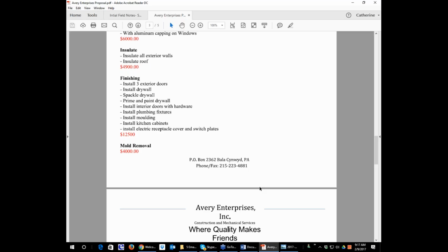So for example, if I put on your project a line item that says install rough-in plumbing for first floor apartments, including waste line and supply lines. Well, if when I get out to the property you have the lines in but you don't have the fixtures, let's say you have half the lines in and no waste pipe, I will pay you 50% of that line item. But I'm going to have to break it down into different categories. Are you okay with that?